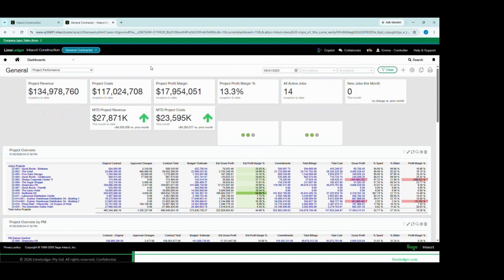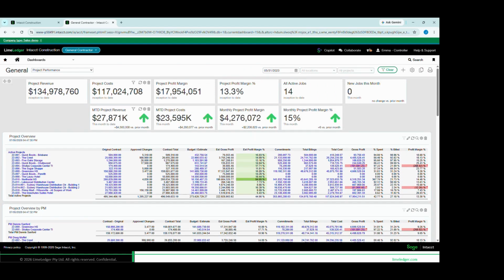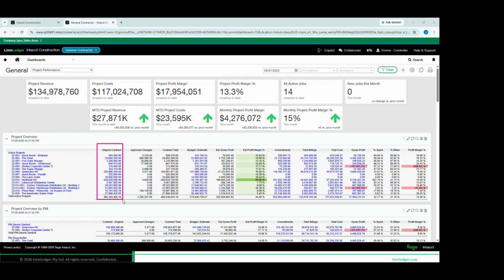Let's open this up again and look at all the projects. I just want to draw your attention to the detail that I'm tracking on this project overview report. What I have is my project contracts. I then have ways of tracking my variations against those project contracts with the customer, and this forms my total contract value. In terms of reporting time period, I'm actually reporting this from inception to date. So if you're the kind of business that runs multi-year projects, you're fully covered here. You can easily run these reports from inception to date and see the entire project's life cycle since it began.